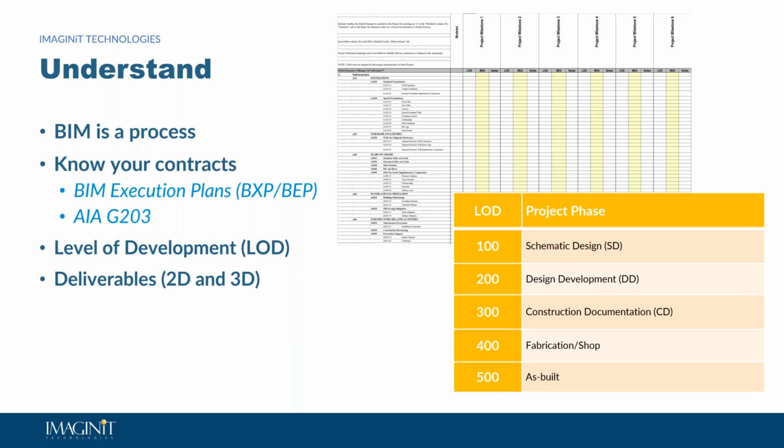So most of the time it's important for coordination, but if we're swapping out equipment or changing the spec on equipment through construction, then that information needs to be updated to support the LOD 500. So hopefully that makes some sense.